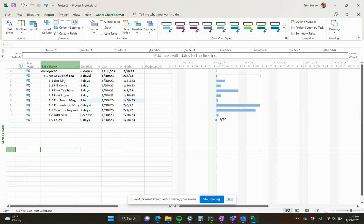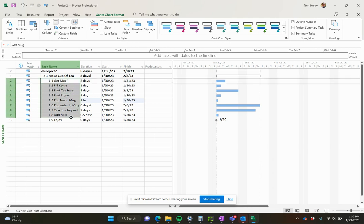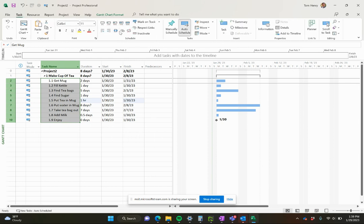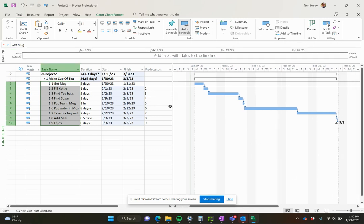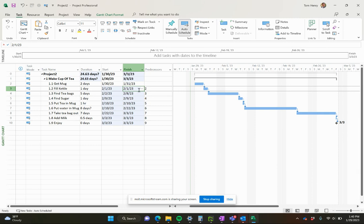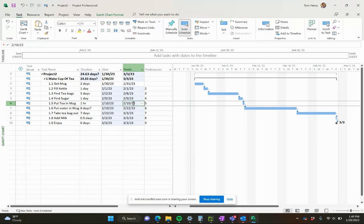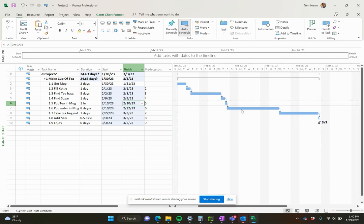Next thing we need to do is link all of our tasks together. I have a video on linking tasks in Microsoft Project. Take a look at that in my Microsoft Project tips and tricks videos. I'm just going to come in here, start at the top, drag all the way down, click on the task ribbon and link them all in series. That is the finish to start. So when one task finishes on 1.20, 2.1.23, the next one can start and so on and so forth as you see here. Like I said, you can get extremely granular. You can have tasks start at the same time, finish to start, start to start, finish to finish, et cetera. There's only four, just like you're probably used to seeing in the PMI handbook.